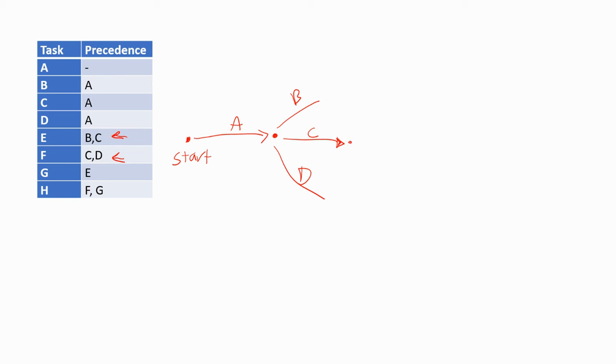So why don't we stop C there? Why don't we stop D there, and we do a dummy link down from C there to D, and we could always launch F across here, and then let's do a dummy link up to here, and we can go there. There we go. That's where task E goes.